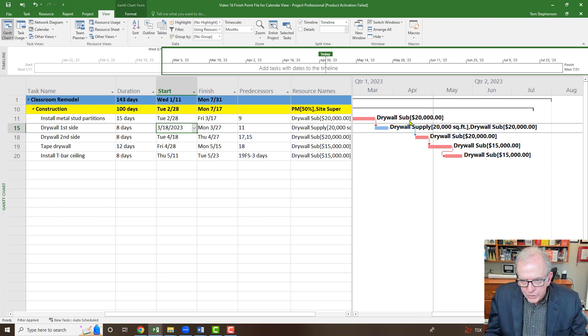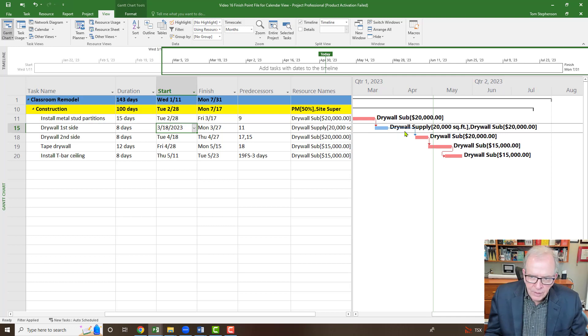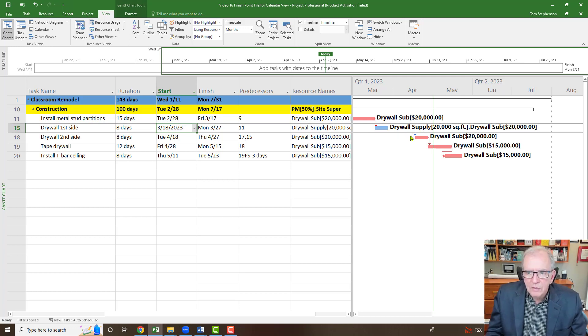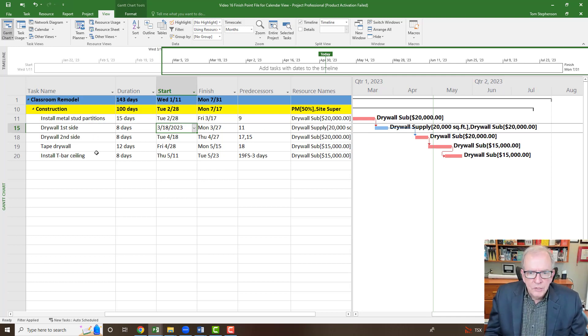We might want to question ourselves what goes on in that blank period of time here. Do they have to leave, and then they have to remobilize? What's the deal going on there? So we might want to look at that a little bit. But we've got that filtered out. Great. Problem is, the drywall sub isn't too good at looking at Gantt charts.